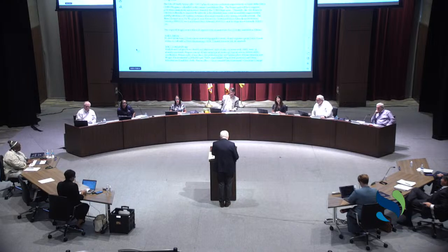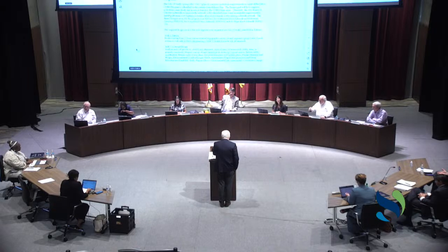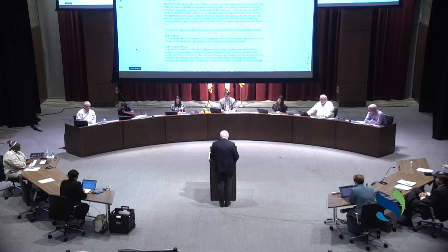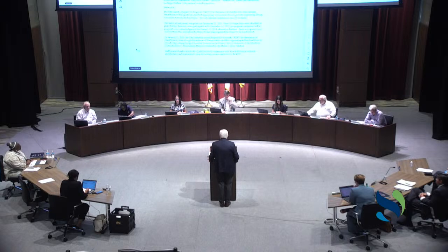Staff did evaluate Kimley Horn's response to the request for proposal, with a consensus score of some 85.75 based on the scoring methodology. And with review of the scope and the services proposed, Kimley Horn presented a final scope and fee of some $730,490 on May 16, 2024 to move forward with this project. Again, Community Development Block Grant, Brooks Act type procurement. We need to go on a qualifications-based assessment in this case. So staff recommends moving forward with the award to Kimley Horn in the amount of $730,490 against an overall program budget of some $2.35 million. Mayor and Council, do you have any questions?